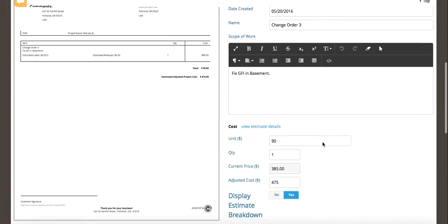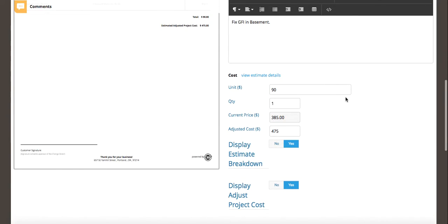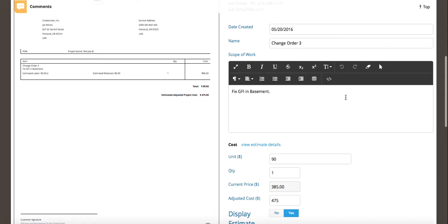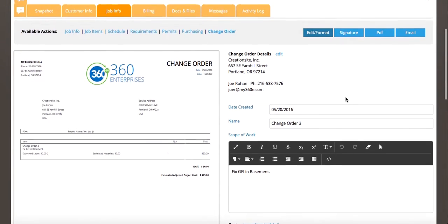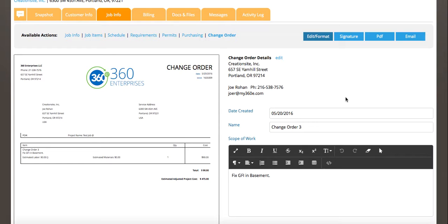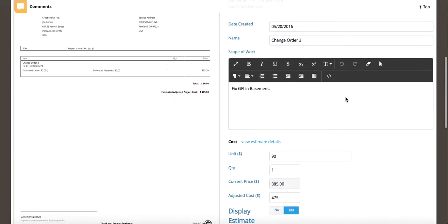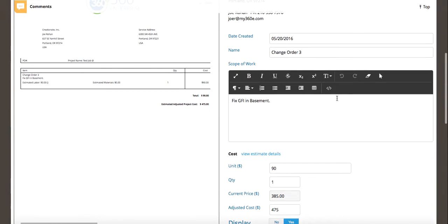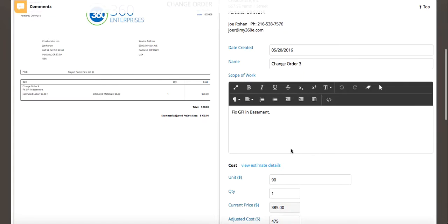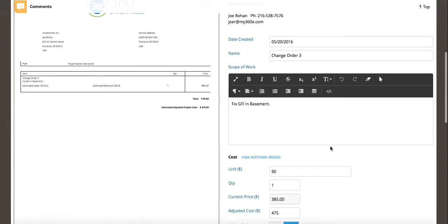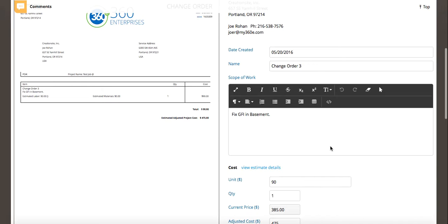Now, this is where small things can save big dollars, because if you have a number of workers and you figure this happens once or twice a week, and an hour's worth of free work goes out, it never gets tracked, and do the math, over a lot of time, a lot of our customers reported to us coming in that one of their biggest money dumps is untracked work and unbilled work. So this is a way of getting that but keeping working. So again, you can have a more formal paper-based trail here, but you can also just be on the job, gain quick approval, and keep working. Or you can simply just track the item so that when it gets billed, you can justify it to the customer. That's up to your discretion here.